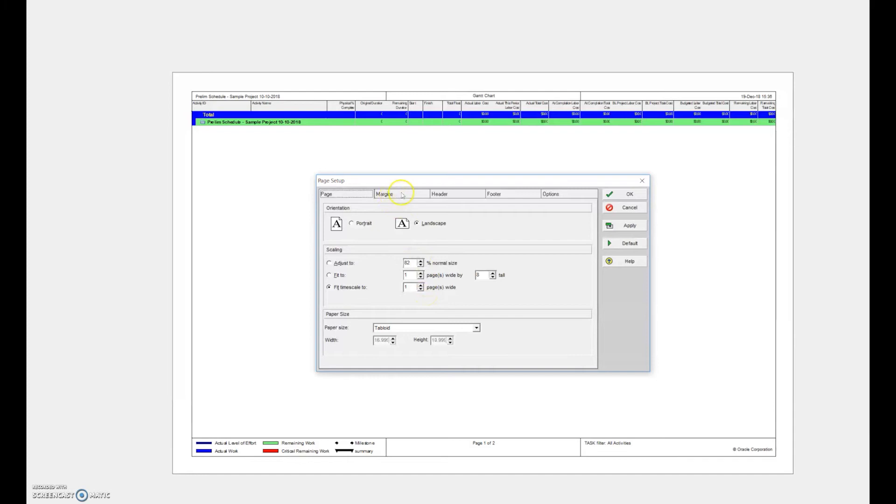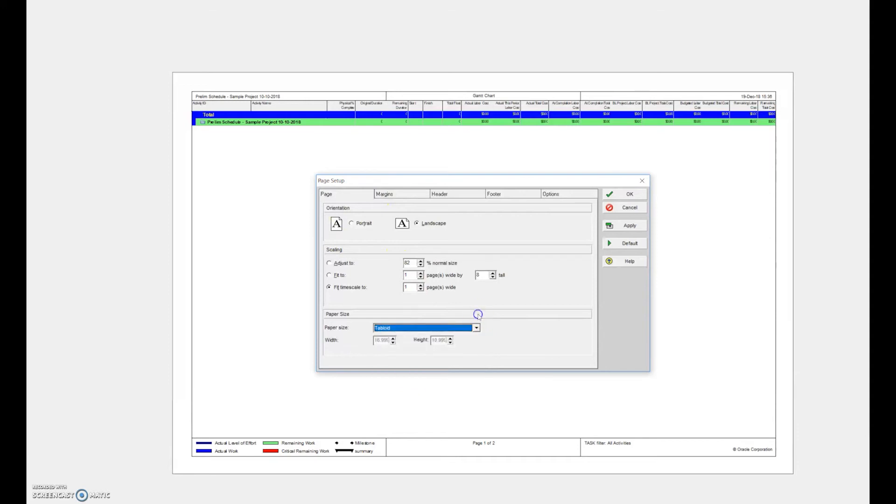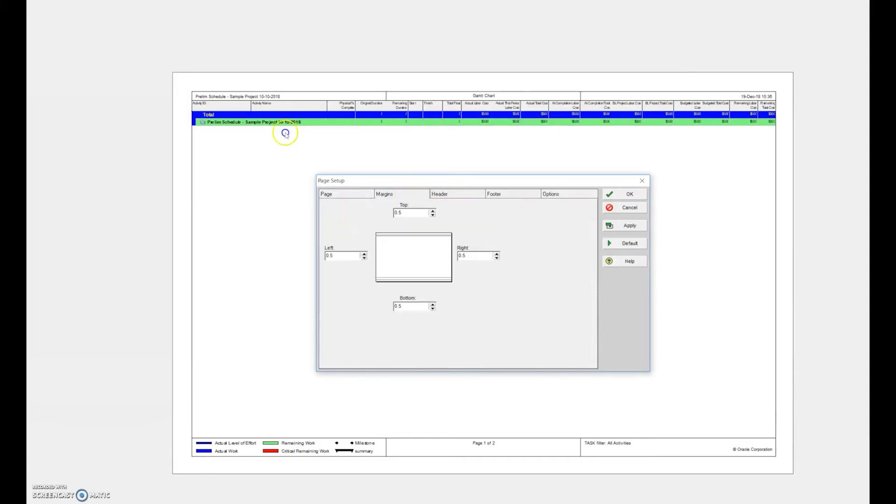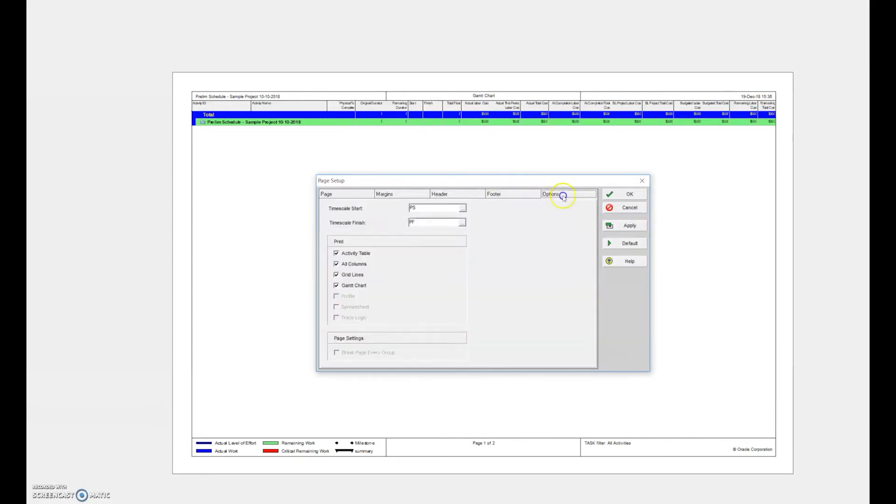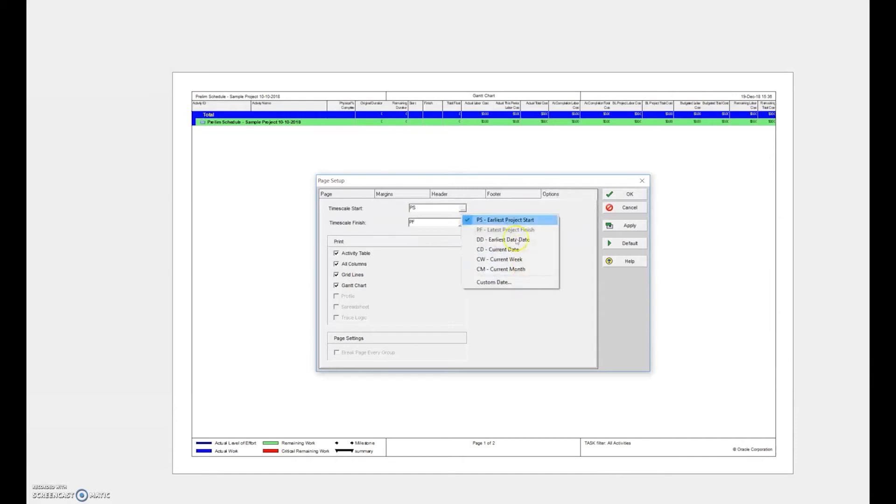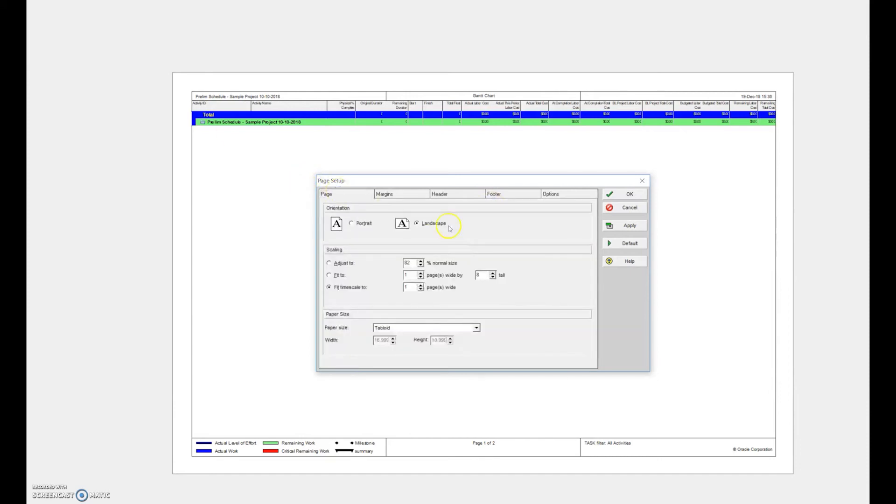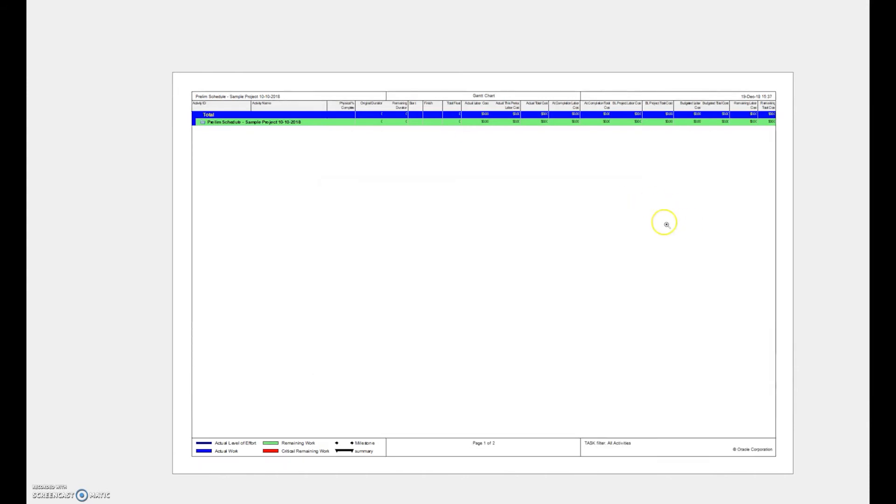Not really going to worry about the margins. You see you have very slim margins so we can get as much on the paper as possible. Headers, we can put different things in headers and footers. And in the options here, we want to start at project start and finish at project finish. So that's what we want to be shown. You can see the options here, but generally we always want to do project start to project finish. When we do schedule updates, we want to make it only go from the data date to project finish. So we have 11 by 17, we have landscape, and we have one page wide. We just go ahead and hit OK. You can kind of see how it says it's still set up there. We'll go out of the print preview function.